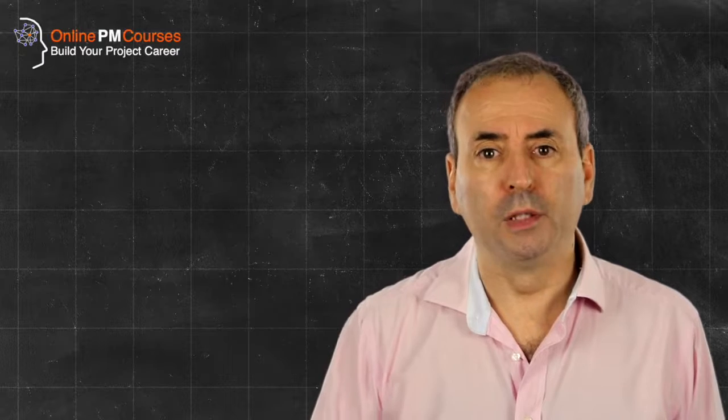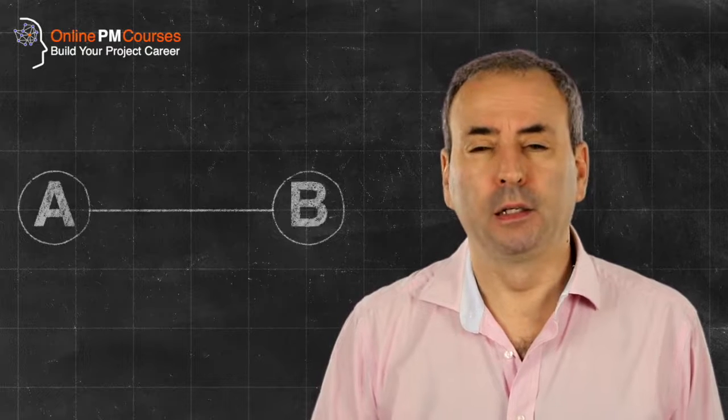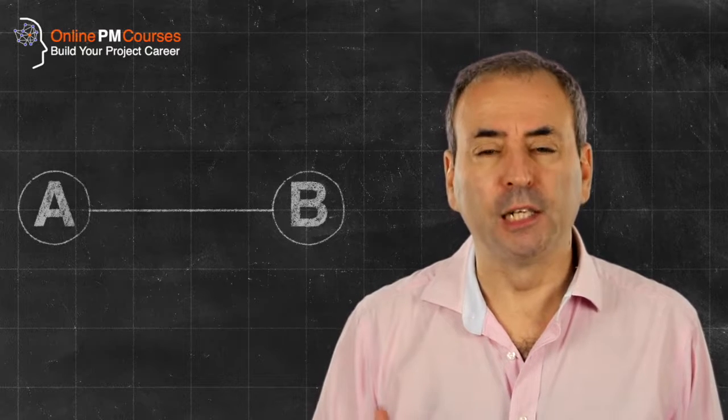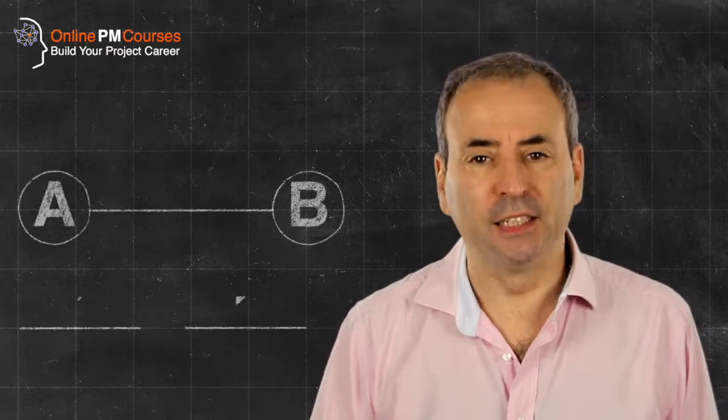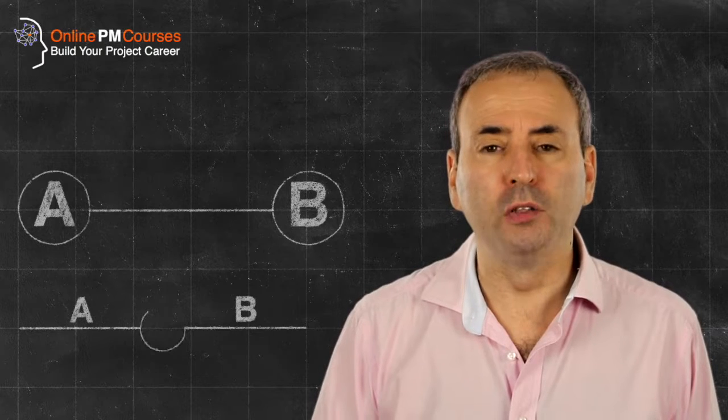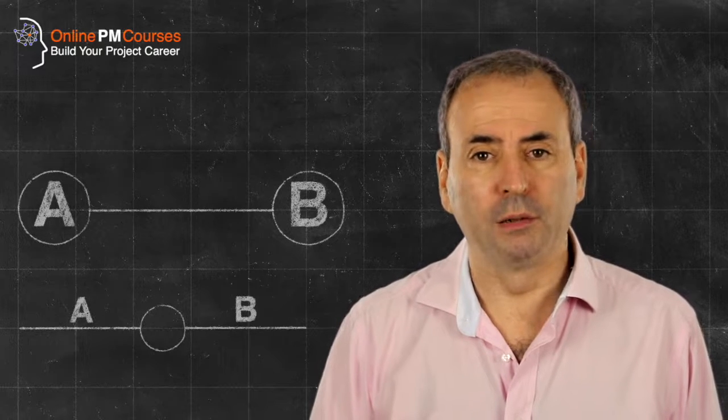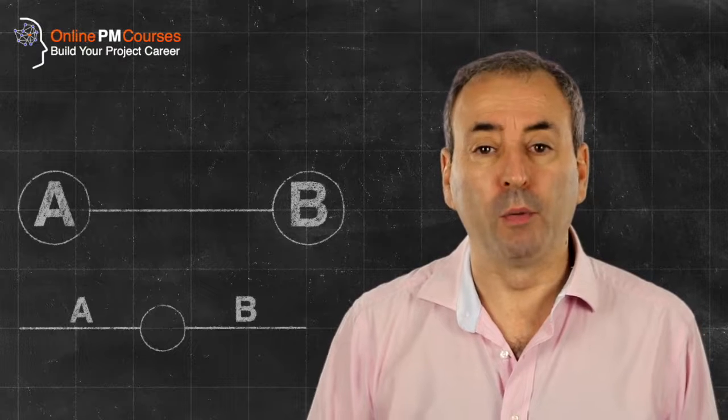PERT charts are less frequently used than their more commonly seen sibling, the critical path method. The critical path method uses activities on nodes and those activities are connected up by lines. The PERT technique flips it over and shows the activities on the connecting lines, and then the nodes represent the branching structure of the network chart.